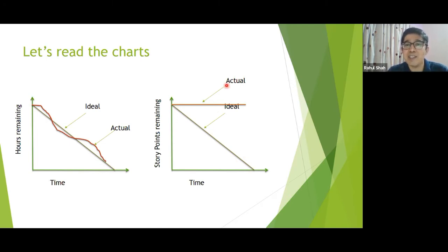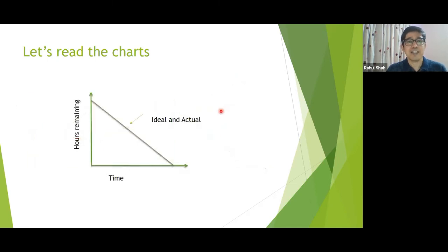And I shouldn't be waiting here. If this is the trend and I am following daily, probably mid sprint I will come to know why nothing is being moved. There's something wrong. Does the team need help? There are some impediments, we should be solving them. That could be the case, right? Good. Let's look at this one.